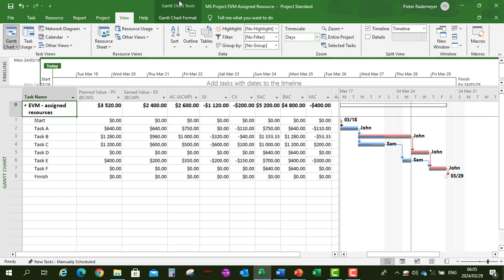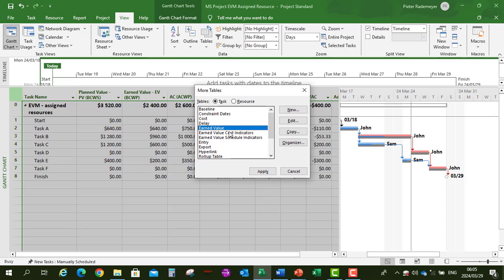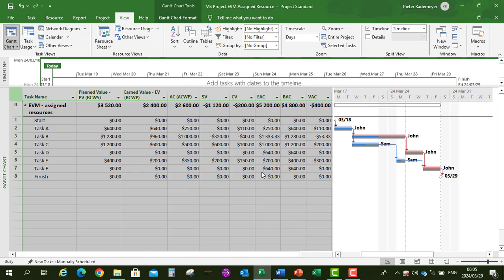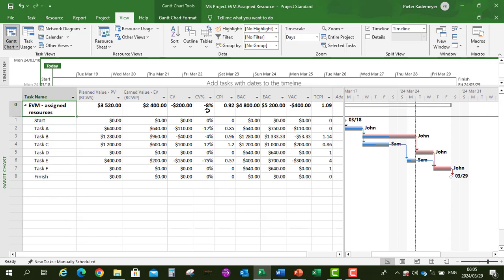Let's look at the other earned value tables. Right-click, More Tables, then Cost Indicators, Apply. This shows: Cost Variance, Cost Variance percentage, Cost Performance Index, Budget at Completion, Estimate at Completion, Variance at Completion, and the To-Complete Performance Index showing 1.09 — meaning the project is harder to complete going forward.